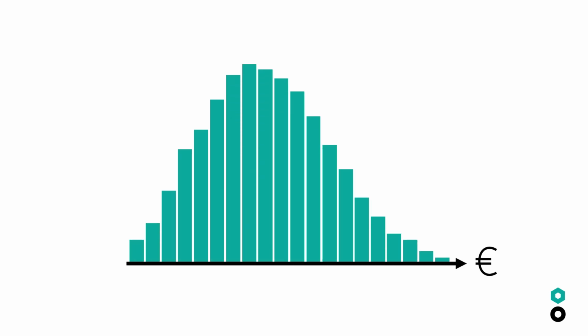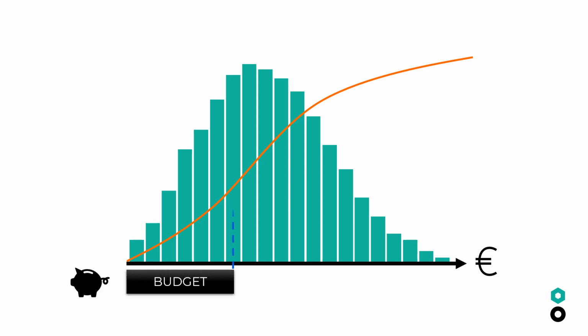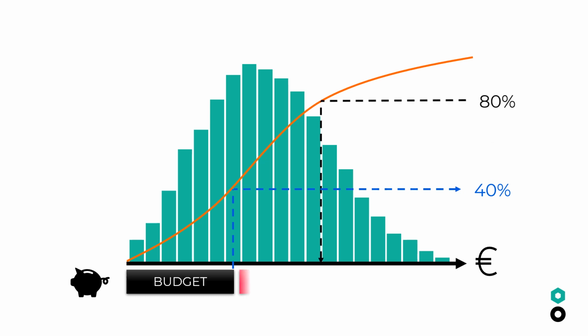By simulating the different outcomes with the Monte Carlo technique, the project costs can be approached as a probabilistic model. It's even possible to simulate complex cost mechanisms like inflation, penalty costs, correlations, and much more. Here, John's current project budget has a low feasibility, where in 60% of the cases, the budget will be overrun. The budget should be increased to allow for a higher confidence level of 80%. This results in an additional cost buffer that should be foreseen in the budget.